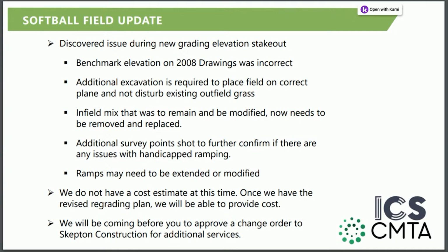ICS, as your representative and supposed to be the watchdog for you, we obviously failed in our mission by not catching this oversight. So we are willing to help out with this change order. Mr. Leckman's made it very clear that the district is not going to accept any of the financial burden of this change order. We agree with that statement and acknowledge that we missed the mark on this one. I don't have a commitment from the architect as well, but we will do what we can on our side to mitigate that and make that go away.